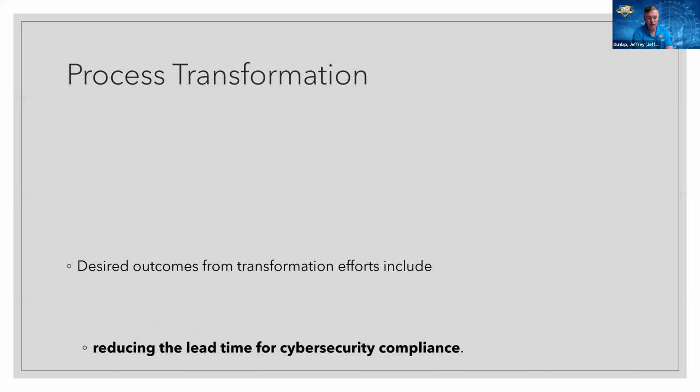And we need to reduce the lead time for cybersecurity compliance. RMF, the risk management framework, is our cyber process in which we decide whether things are compliant. We need to basically reduce that time and basically build it into the software development. That's DevSecOps. That's the sec part. So we got to shift that to the left. And when we're ready to deliver a software capability, we're able to push it out within 24 hours or 48 hours.